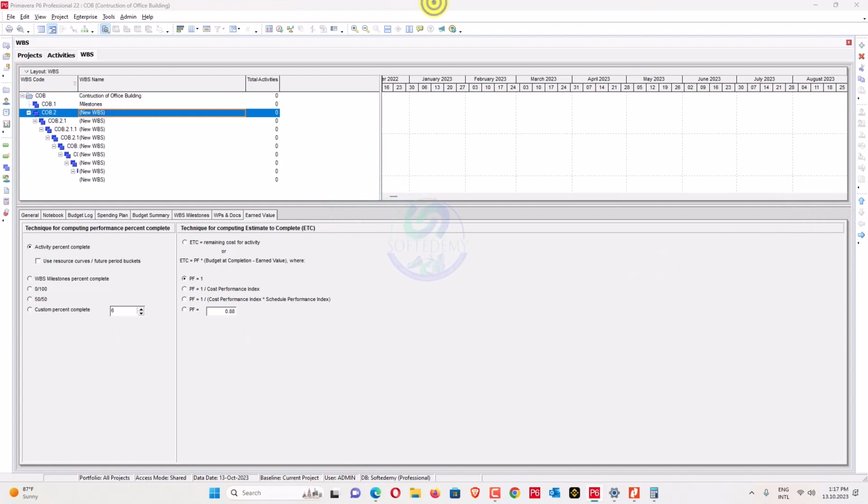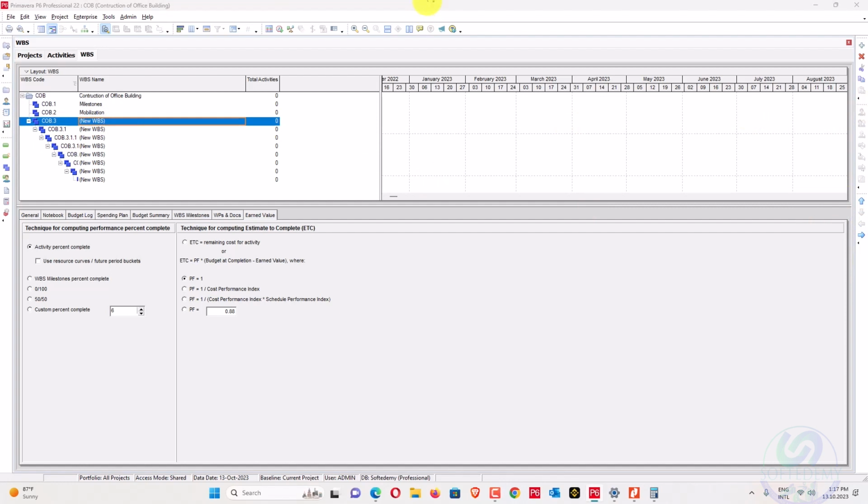So whenever someone asks you to make a schedule with a WBS, you can understand from here that when there is a value like 1, it means level 1. If we have 1.1, it means level 2. So level 2 can be understood from there. The next one is substructure. So we can add substructure here. We'll go to the bottom till the end.